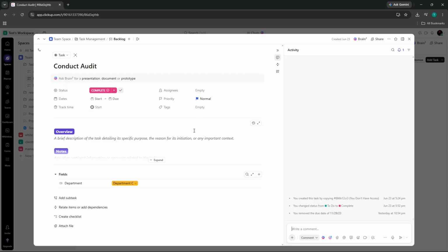Assign a priority to every item using ClickUp's priority flags: urgent, high, normal, or low. Priority is what transforms a flat list into a properly ordered backlog. The highest priority items should always sit at the top, reflecting what the business values most right now, not when the tasks happen to be entered.